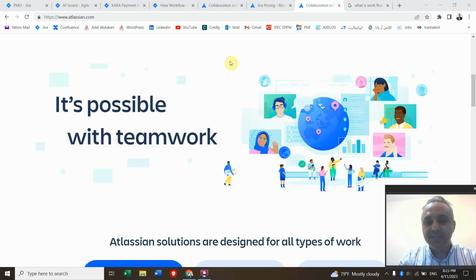The first thing is that we don't have the work breakdown structure, or the definition and breakdown of the whole project deliverable, at the initial stage of the project. The second thing is that we prefer to break down the work of the project into short time phases that take between 2 to 4 weeks. In Scrum methodology, we call it a sprint. In each sprint, which may take 1 month, we focus on delivering the work defined for that sprint.